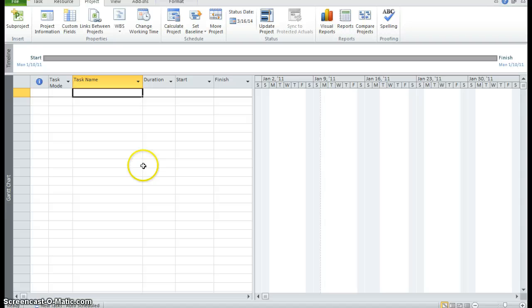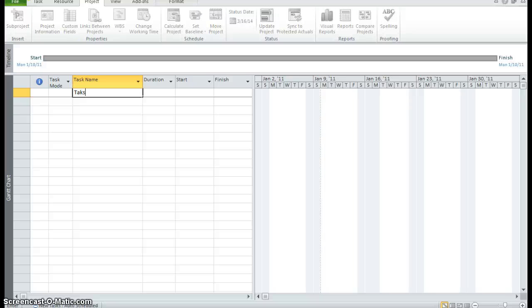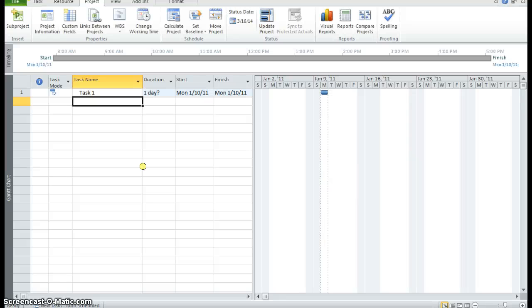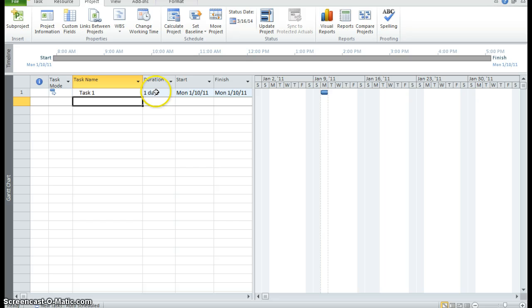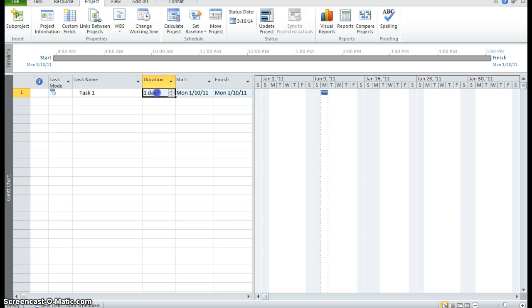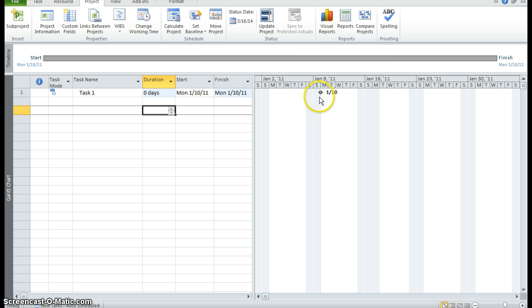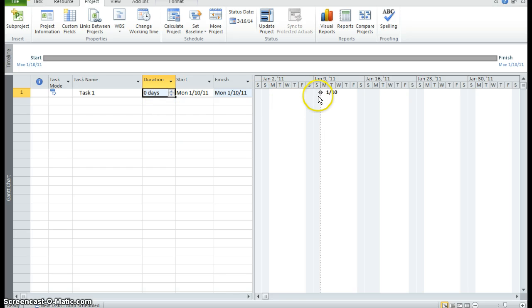Now we want to enter our task. So I'm going to put in task 1. And just in case you need it, as I do, you want to make sure you know the spellcheck is F7. And I'm going to press enter which I did. Now by default, project always schedules one day with a question mark. You can make this particular day any day that you want. If you put it as a zero day, it is a milestone.